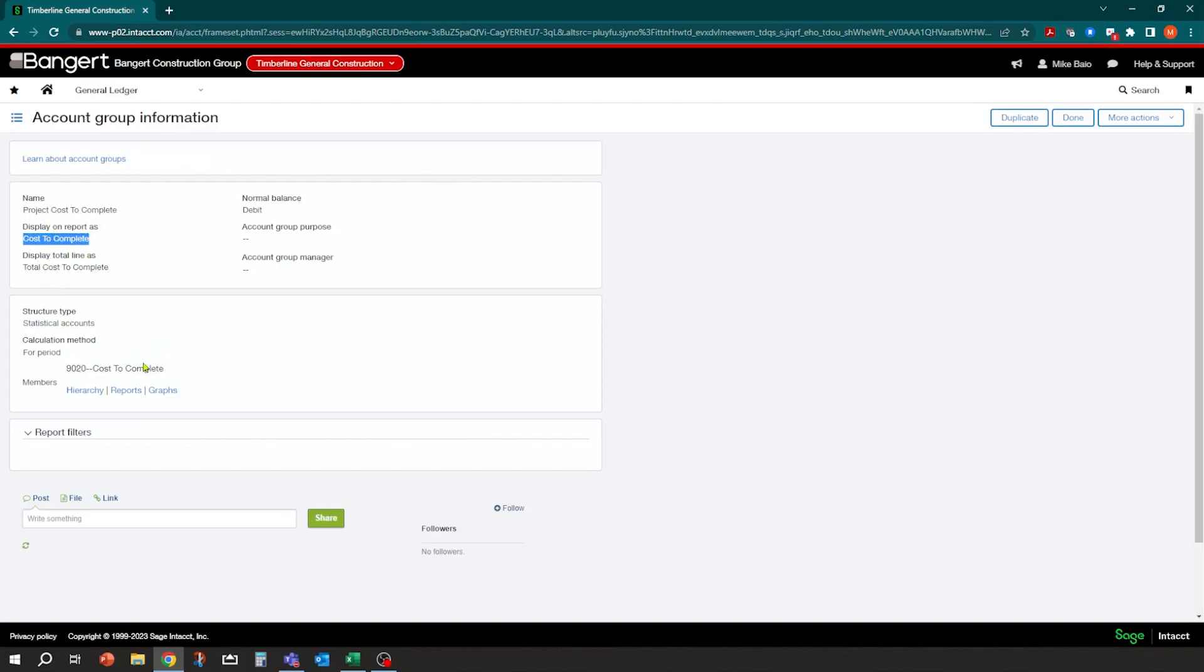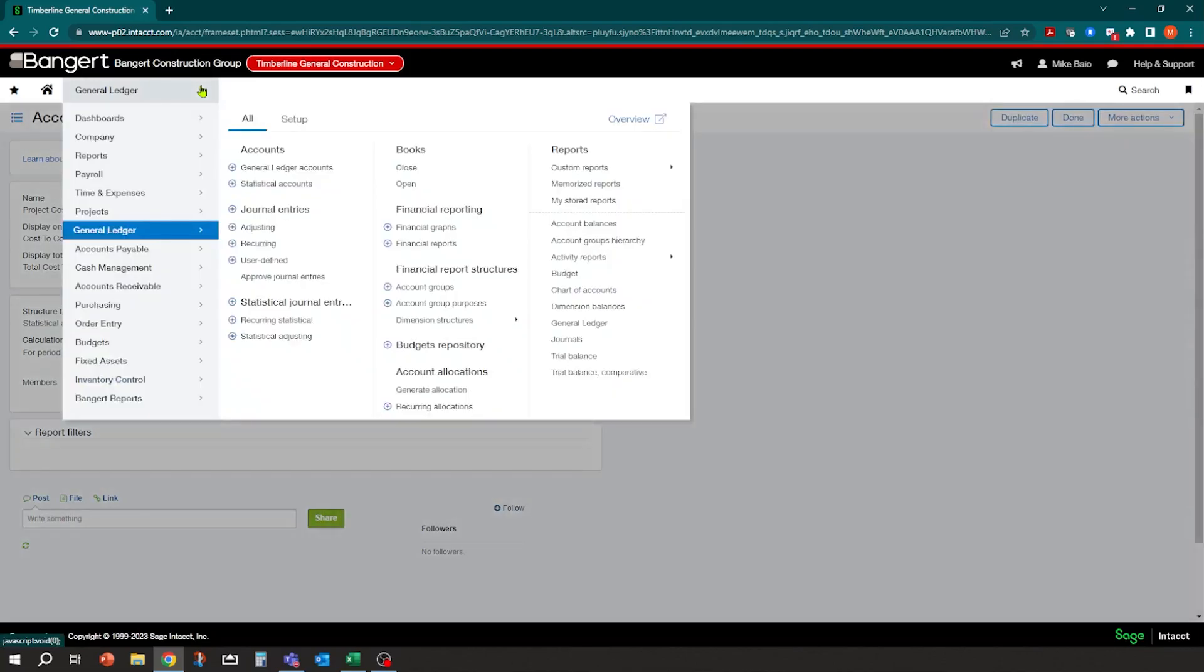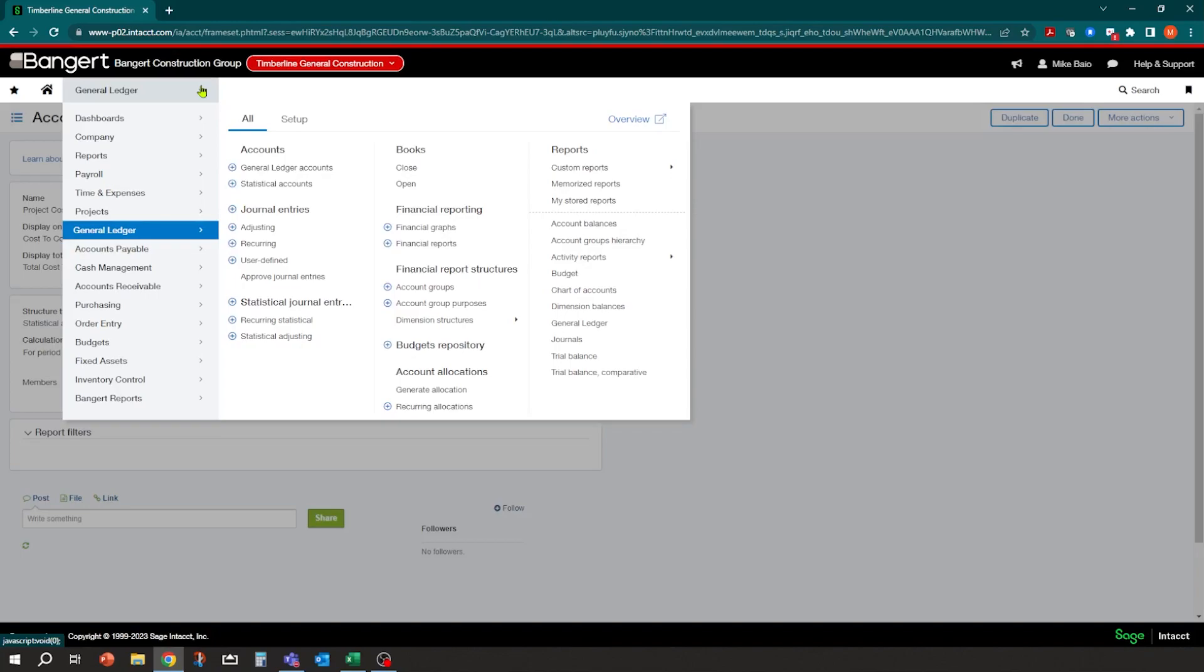So once you have your cost-to-complete statistical account set up, it's really a matter of going in and entering some monthly projections based on that. And the way we set it up, it's based on the month. So what's really nice about that is you can have a transaction saved so you can see what it was for the current month. And you can also go back and say, what did I project last month? What's going on here? Why this change in between the periods as well.